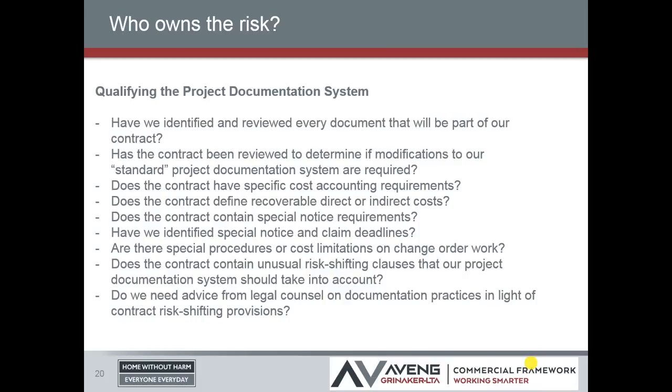Well, under a normal contract, you need to do all that you can using reasonable skill and care to identify unforeseen physical obstructions. So if you've carried out surveys, if you've engaged with all of the utility providers and you've done everything a reasonable contractor could have done, and that's been documented, and this is a really important part, then you later on find something that no reasonable contractor could have anticipated, you can still be entitled to an extension of time with cost, despite the fact that the contract has been written to say that the contractor carries all risk. Do you also then need legal advice?